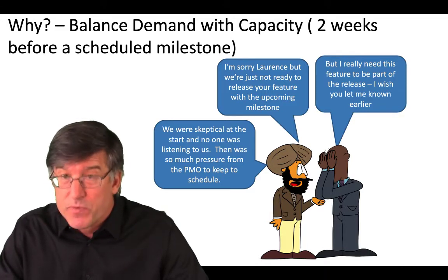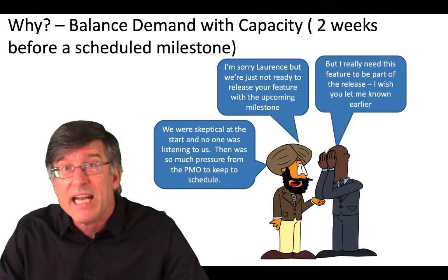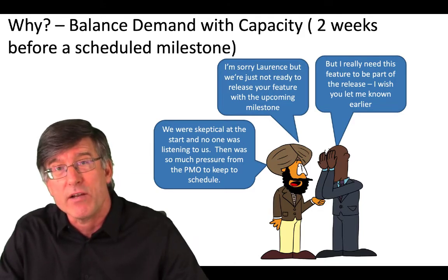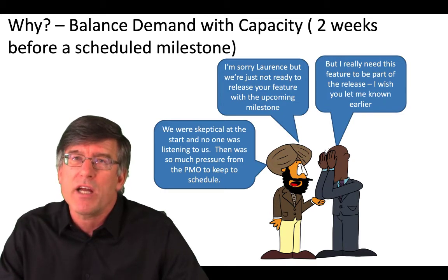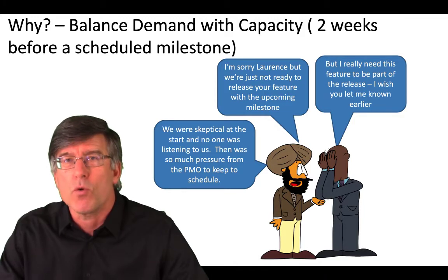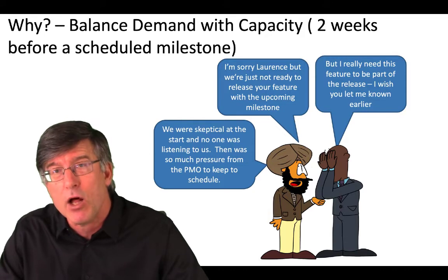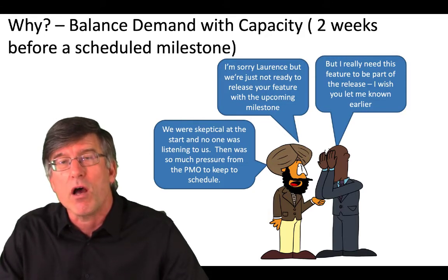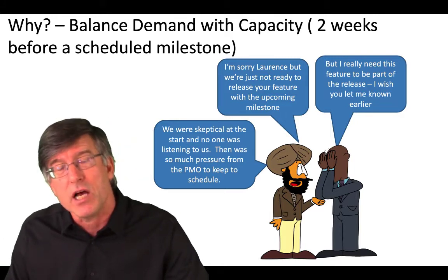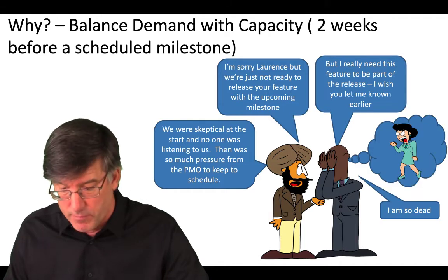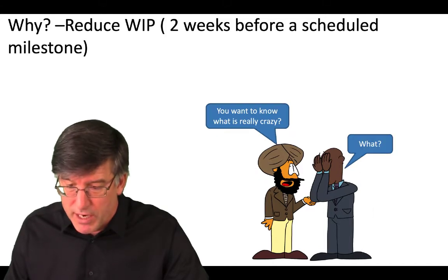So here, during PI planning, the teams will do the planning themselves, not have somebody else do the planning for them. And if you remember one of the Agile mantras, those who do the work, plan the work. This is simply one of the reasons why we want to do this: during PI planning, we can legitimately tell whether or not we do in fact have the capacity to take on that work, not have somebody else tell us this is the work that you need to get done. So you can see here that Lawrence is not very happy about the situation that has transpired.